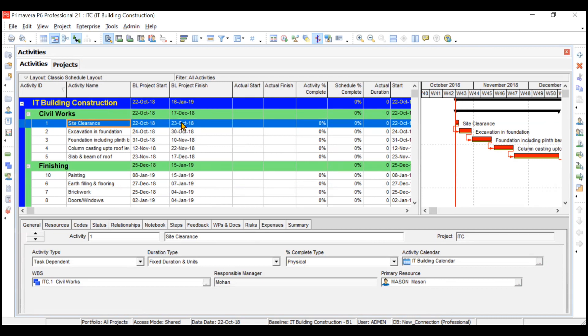First we need to decide the date up to which we are updating. Looking at BL Project Start, the first activity is 22nd–23rd, second is 24th–30th, and third is 31st to 10th of November. Let's say we are standing on 5th of November right now — note this date and we will update the progress of our project up to 5th of November.